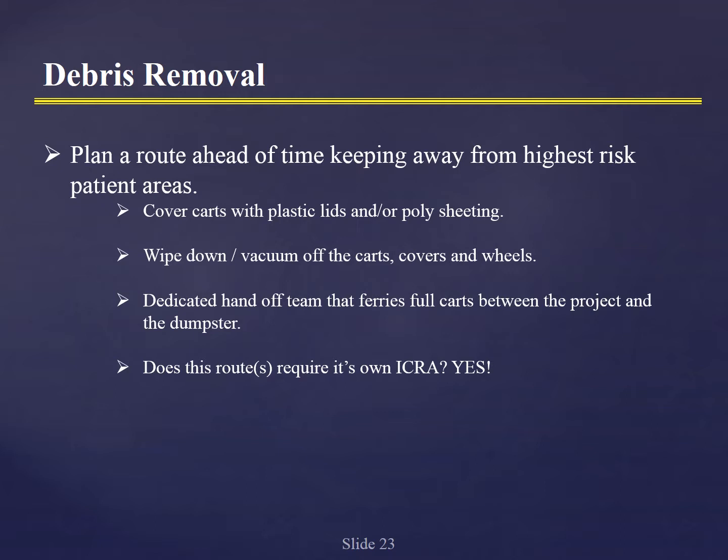Dedicated hand-off team. Interesting concept, that you keep people separated. When people come out of projects, they are often very dirty, and they can track material all over. You can only imagine if you were able to put some kind of tracking material on contractors and then let them travel around the hospital and have some way to follow where they've been. I mean, no doubt contractors go all over. They definitely hit the cafeterias. They definitely go in and out of departments, in and out of construction sites. And so the potential for contamination and cross-contamination is pretty constant.